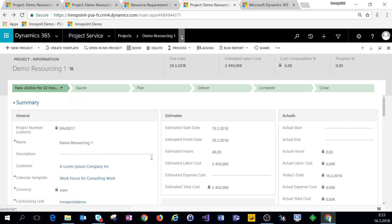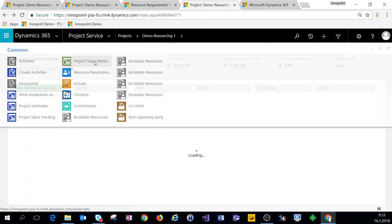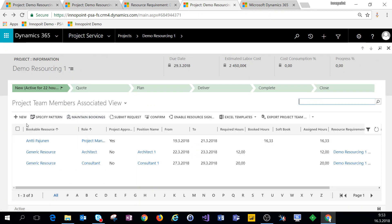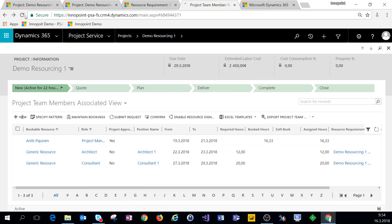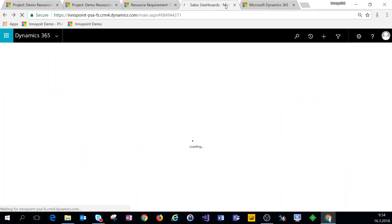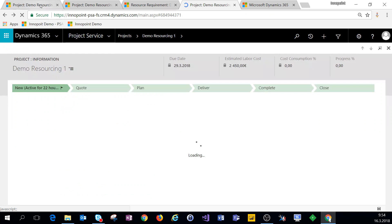In addition to booking bookable resources and replacing generic resources using the project team member view and the Book button, we can also add new team members by clicking New. This is more of a manual task as opposed to using the schedule board. When we use the New button and add a project team member this way, we actually have to manually add that team member on the work breakdown structure as well.